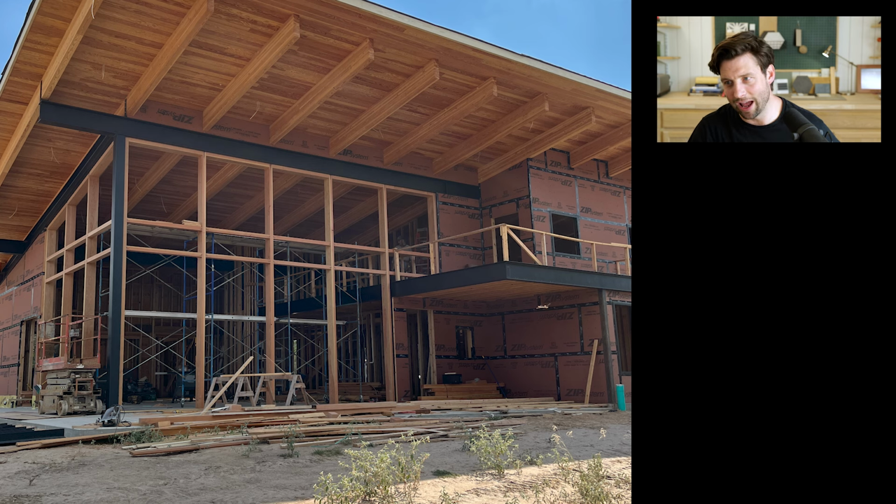And then we get further down the design and we start getting some bids, and they come back with this glazing package, the 20-foot section. And they're like, look, you can save $100,000 on the package if you broke this window up somewhere. And I'm like, what part of no problem do we have a disagreement on? Like when I say something's no problem, I would say it's doable, but just be aware it's going to cost you another $100,000 if you go floor to ceiling. And if you break it up, you can save a smooth $100,000.